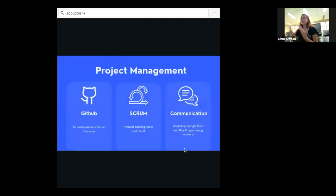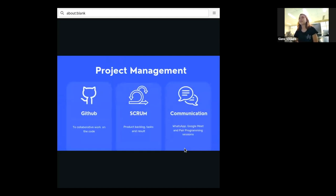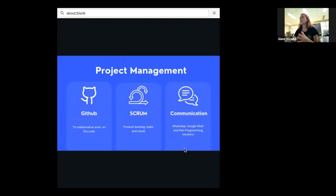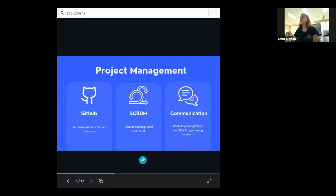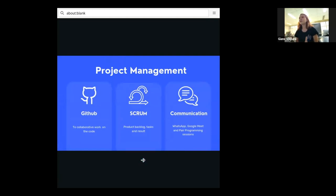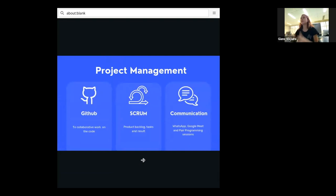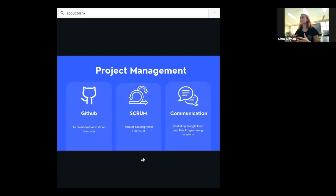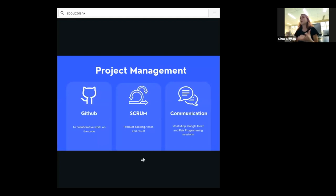About the project management, I didn't work on the project alone. There is also Alex, that is one of my mentors in this project. And for us to work collaboratively, we use GitHub so we can put our code out there and work together. We also use a kind of Scrum methodology to delivery. So at first, he created the product backlog with all the tasks we would do in the project. And every two weeks, we go on meetings to divide those tasks between each other and show the results we got.